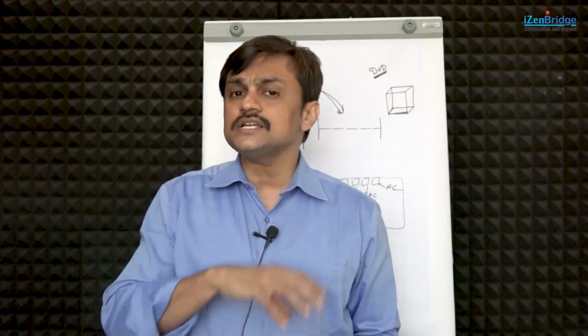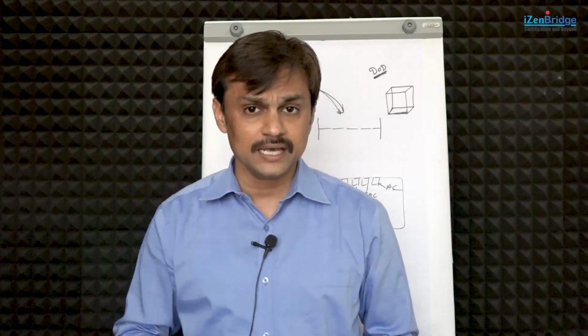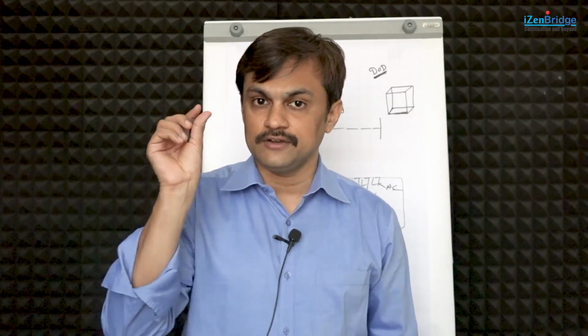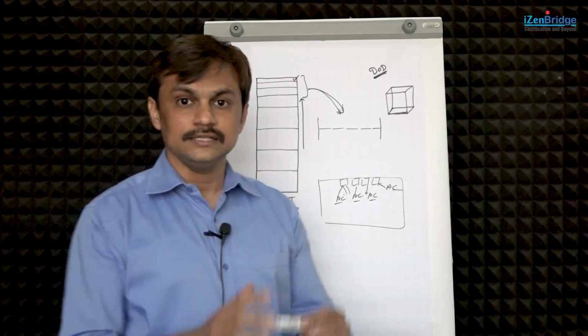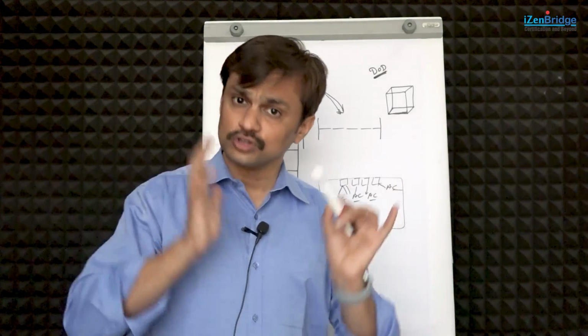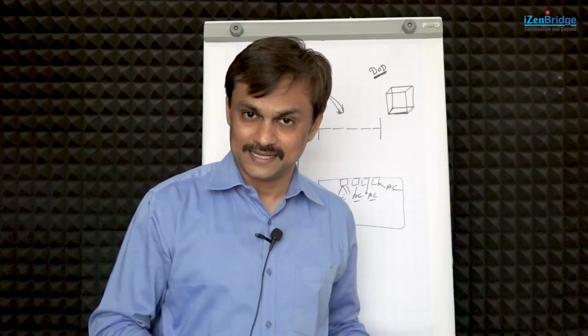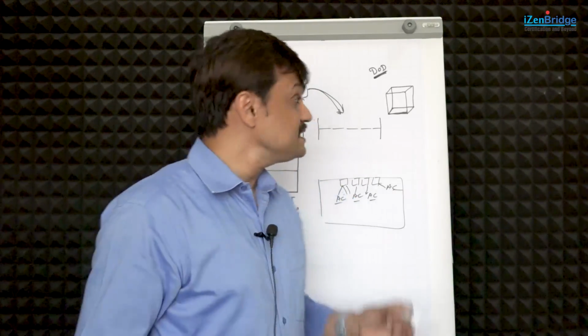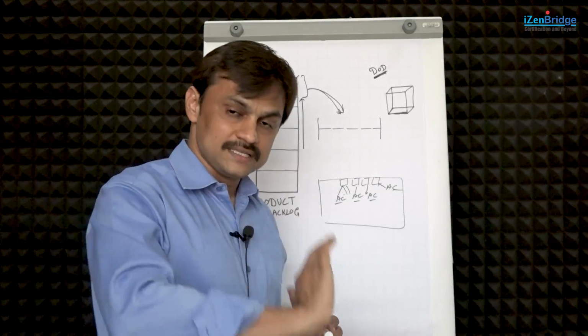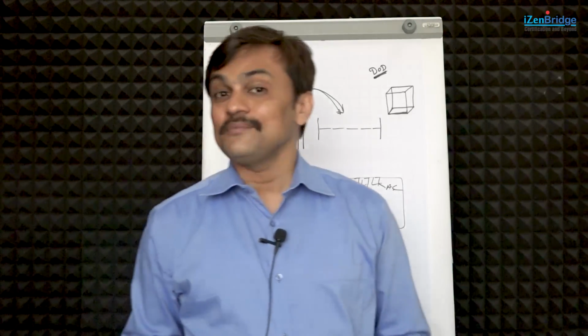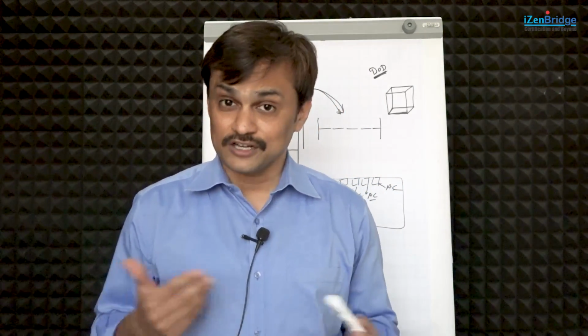Now, that generic part which might be common for burger and other items which your restaurant might be selling is the definition of done. The part which is talking about I need with cheese or without cheese is an acceptance criteria. In order to get the burger order completed, we need to meet both. We can't just meet a definition of done without meeting the acceptance criteria. Or I can say, in order to complete a given item, I need to meet acceptance criteria and the definition of done. Now, you may have got some idea, or maybe my conversation might have confused you further.